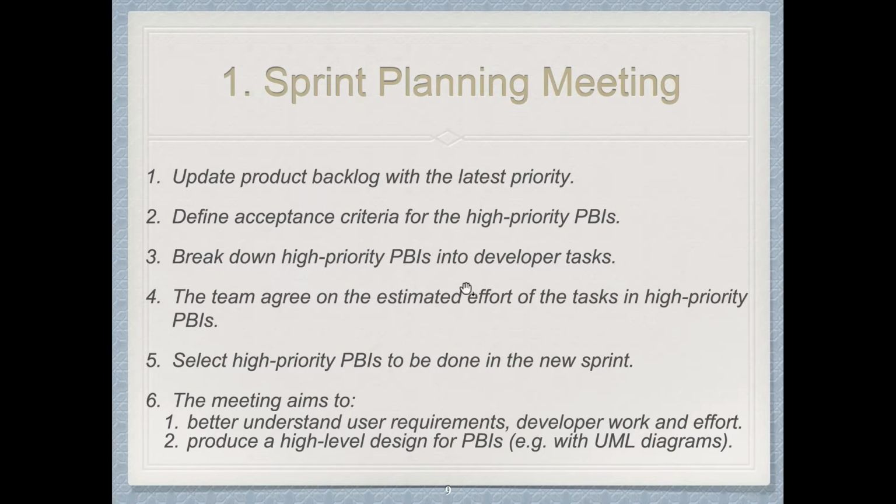Okay. For example, let me give you some very simple arithmetic to do. If our sprint size is 2 weeks, and we have 5 team members in our Scrum team, 5 team members, 2 weeks. 2 weeks, we assume 10 working days. How many person days do we have in one sprint? How many person days?